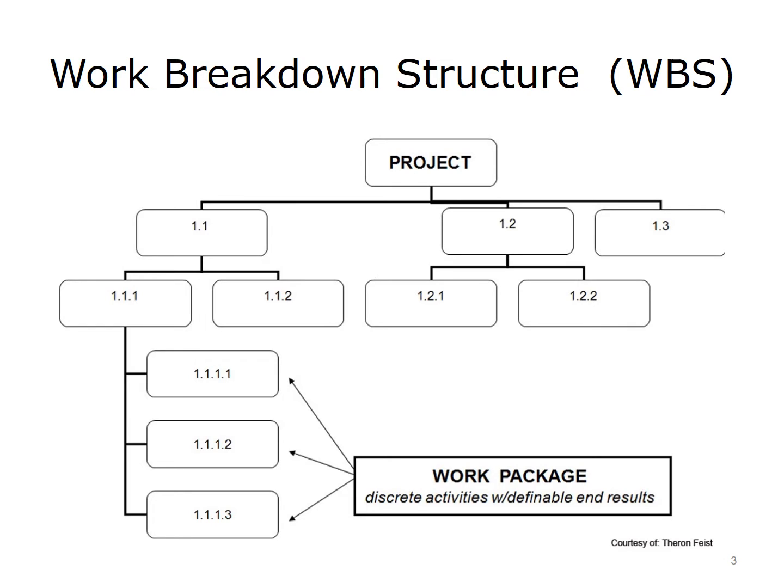The scope statement is broken down into small, manageable components through a technique called decomposition. Decomposition continues until all work is eventually broken down to the lowest level of the WBS, which is called a work package. You can see this process illustrated on the slide in the graphical depiction of the WBS. In theory, work packages are typically 8 to 80 hours of work.